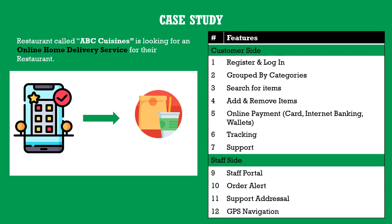The high-level features requested by the restaurant include 12 items. There are seven customer-facing requirements: registration and login, grouping of food items by categories, ability to search for food online, ordering, ability to add or remove items from the cart, online payment via card, internet banking and wallet, order tracking with ETA, and a support feature to raise queries or issues through the app.